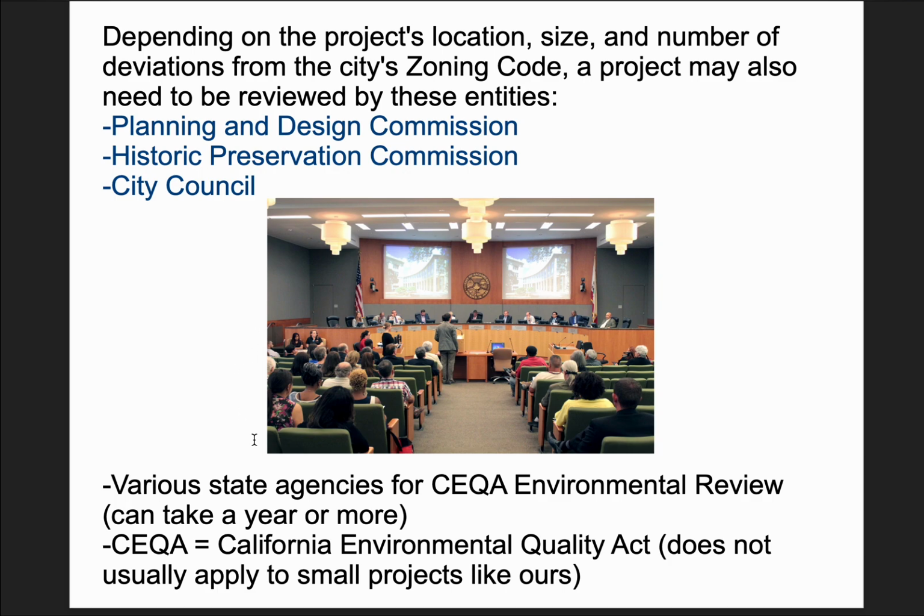Now there is also nowadays an environmental quality commission, based on the California Environmental Quality Act, for large project development, where sometimes you want to create a hospital, or a casino, or an industrial complex, that you have to go through some state agency where they would study the environmental impact of your project. If you only have a small restaurant that you want to build, typically you don't go through the agency that has to evaluate your environmental impact.